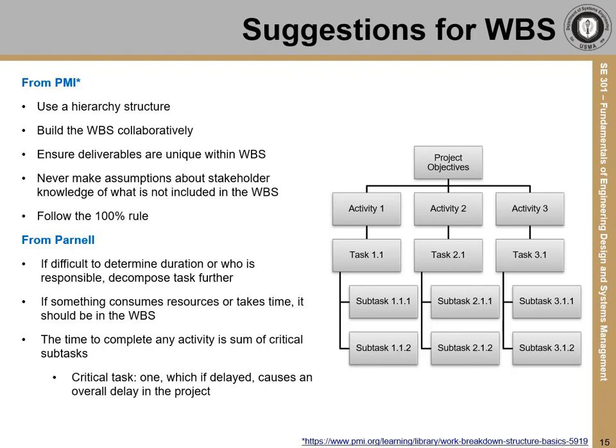Nothing should be left out or assumed. A few additional suggestions from the textbook are also good practices. When looking at a task or deliverable, if the team cannot determine who is responsible or how long it will take, then the task should be decomposed further.